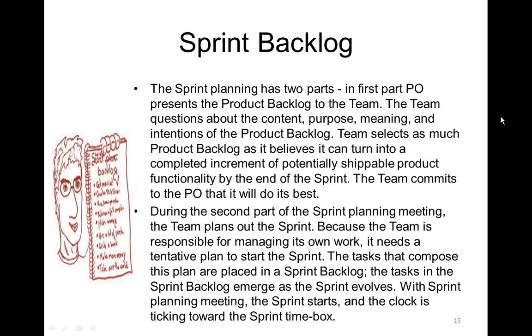We will talk about some other activities as we progress with this sprint discussion. As I said, once the commitment has been made about the stories, the team has to detail out the tasks required to make that delivery happen. For that purpose, they again have to break down those stories into finite tasks and estimate what kind of time and effort will be required for each task.